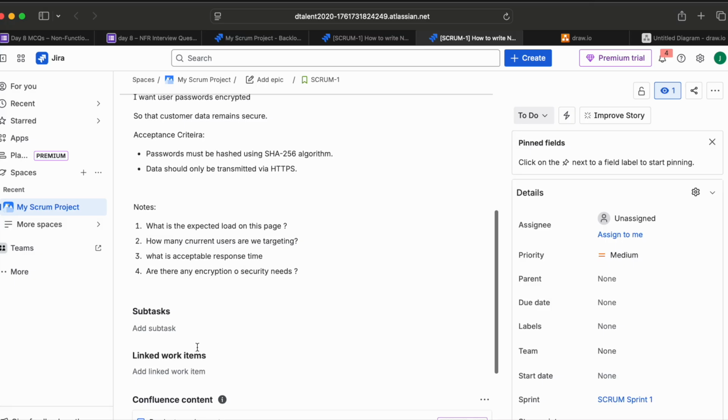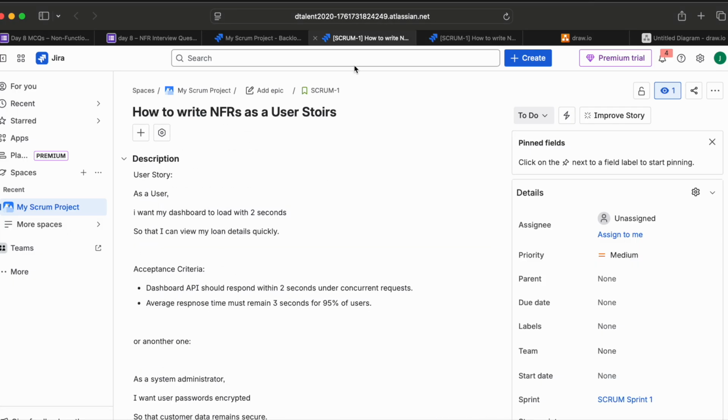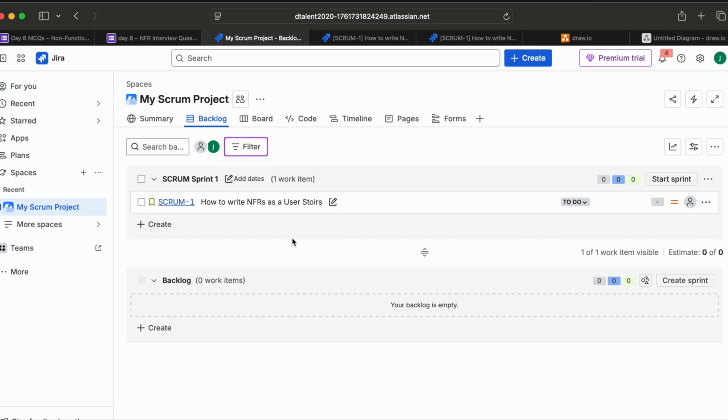So it's not something straightforward like functional requirement. So for example, adding caching, security tokens, or stress testing might increase story from 3 to 5 points. So when you participate in estimation session, always bring up a non-functional expectation as well. Okay, so this will help testers and developers. Okay, so let's estimate this one, 5 user story points.